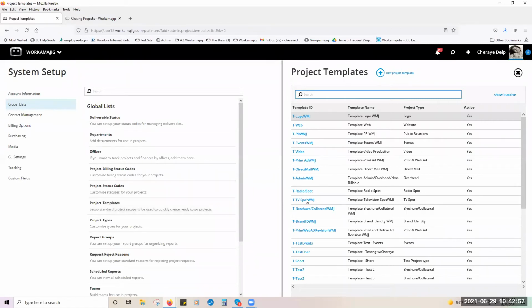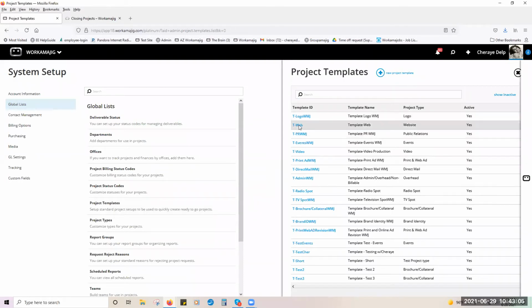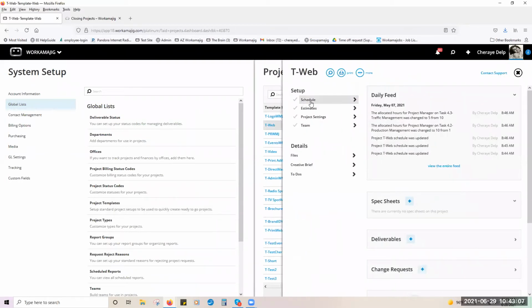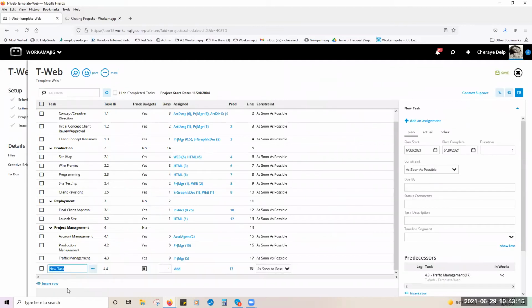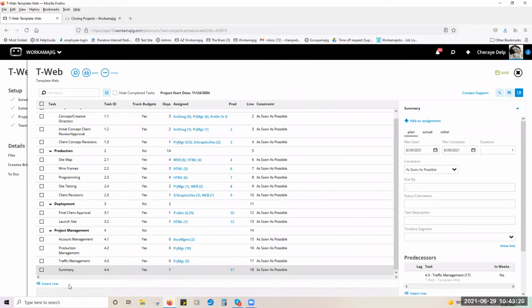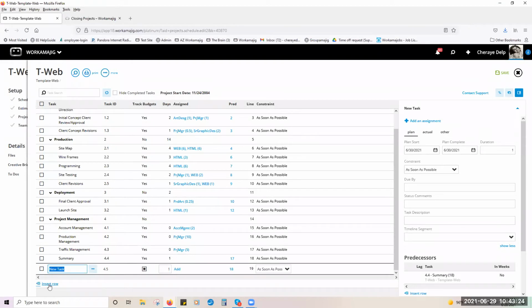Okay. And also somebody wanted me to show how you do the summary and subtask. So I can go ahead and do that really quick. So let me just, let me see if we can go in here and do it. And hopefully this will be a short schedule. Okay. All right. So to create the summary and subtasks, I typically recommend just coming in here. So I'm going to call this my summary. I usually create the two tasks together. The summary is going to be the bolded, right? And then the one underneath it is going to be my subtask.